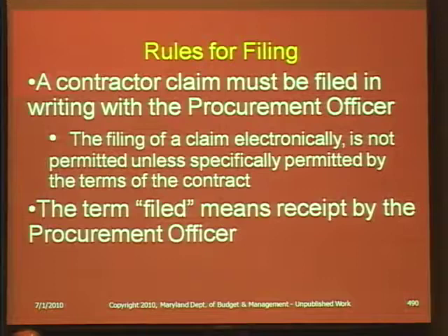And I don't know whether it was because of that, but after that is when the attorneys came up with this electronic procurements authorized clause, which I was very happy about because now it said in great detail what was permitted electronically and specifically what was not permitted electronically. And from my standpoint, if you tell vendors, then fine. I'm all for holding their feet to the fire if we've told them what the standards are. So that is substantive. If it's not allowed to be filed electronically and they file electronically, they're going to lose, just on that basis alone. And the term filed means receipt by the procurement officer. And if it means hard copy, that means a hard copy receipt by the procurement officer.